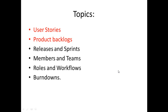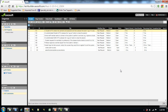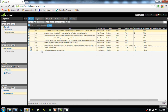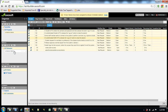Now we have to create a release and sprint. To create a release, click the Add button here and enter the release name, Schedule Maker Release. We cannot specify the capacity yet — capacity means how much the workers can work on this project during this duration, which we don't know yet. Let the release be two months and save it. Then we select all the user stories and drag them down to the current release.